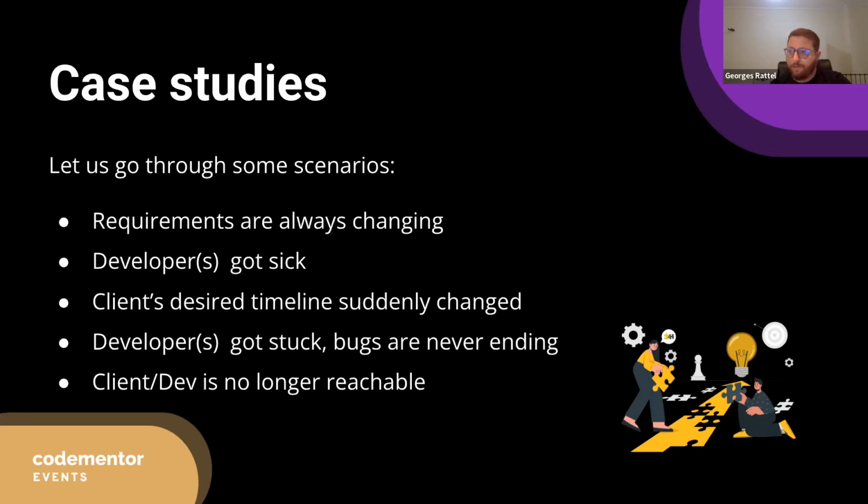So what's better is to also ask. Now the answers are kind of changing. Some people answered, ask the developer if anything needs to be done. The developers themselves are the people most aware of what the risk is here. If they got sick for 2-3 days, sometimes they've already accounted for those days in their contingency plan. Then they would tell the client, no problem, these were already accounted for, so the project is not at risk. But here's a point that requires transparency, which we mentioned earlier.